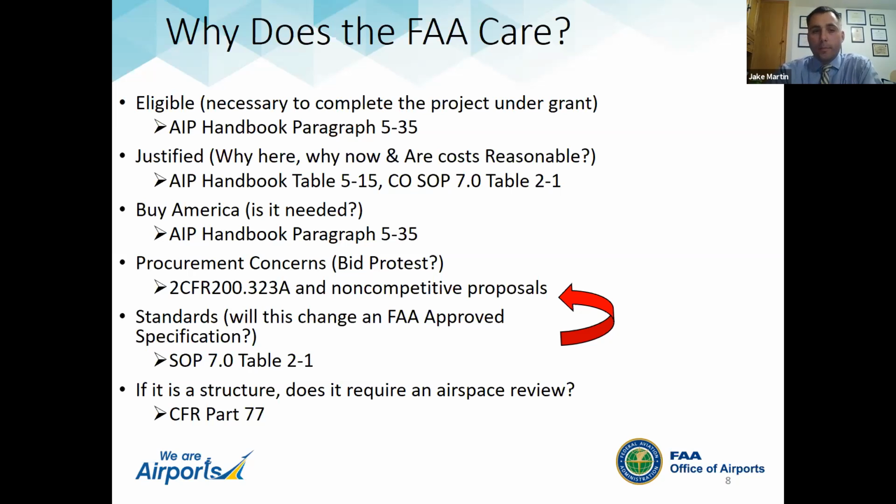I laid out a little bit of the procurement concern already. It's considered a non-competitive proposal, and we want to make sure that nobody is going to come back after the fact and file a bid protest. Our role in addressing the procurement concern is really to look at it, look at some other examples we might have, back channels in the nationwide airport system, and tell you that yes, we think there's a risk here that you could have a bid protest. We strongly encourage you to take a look at this with your city attorney, assess some of these risks in the contract, and make a determination from there if you still want to proceed. So our role is really just to advise you that this could be a concern for you.